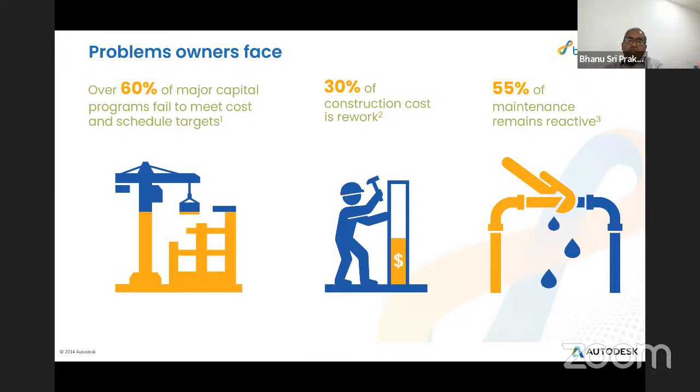But when collaboration is essential and required, and you are not using a process-driven approach, there are a lot of missing items. Those are the major aspects we face. One of the first challenges mentioned is cost and schedule. Costing speculation is typically 3 to 5%, but in construction it is 10 to 15%, which is very, very high. Because the duration is also very long, sometimes the project cost even goes double. We have a lot of challenges like that. So that's exactly why you are equipped and engaged in the right place.